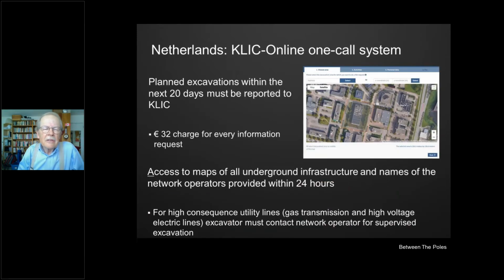In the Netherlands, this is a remarkable system called Click Online, and it's basically the Dutch one call system. If you are going to dig somewhere, you can log on, you can define a polygon and say, this is where I'm planning to dig, and within 24 hours, you will have a map of everything underground in that area, from all of the utilities and telecoms in that area.